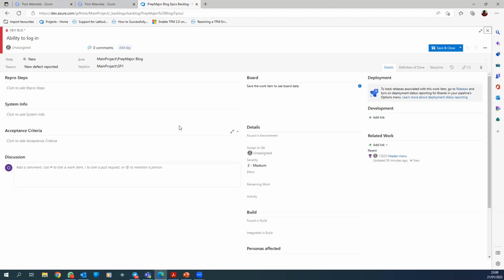The feature can be cooked sauce and maybe parboiled rice. Do you understand? And then that cooked sauce, you can break it down to chop onion, fry, add seasoning, taste. And then this one, boil water, and boil rice. Do you know what I mean? You can make it what you want it to be, as long as you are breaking it down to a small enough size that can be completed within a sprint.